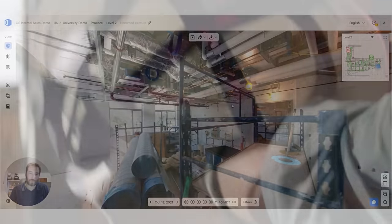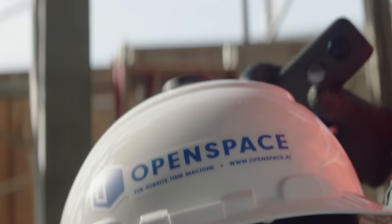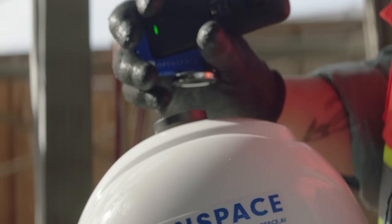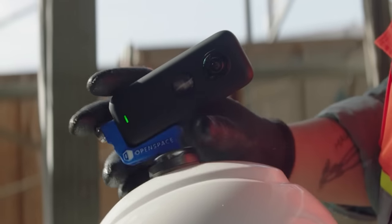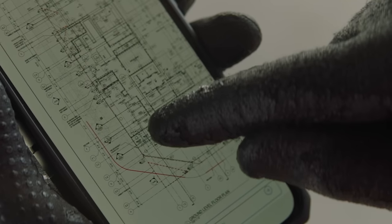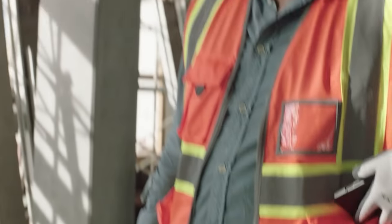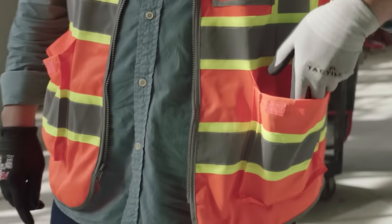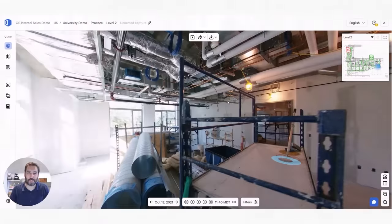To capture with OpenSpace, all you have to do is wear a 360 camera on your hard hat, open the OpenSpace app, select the level you're about to walk, tap the plan where you're starting your walk and hit record. And that's it.